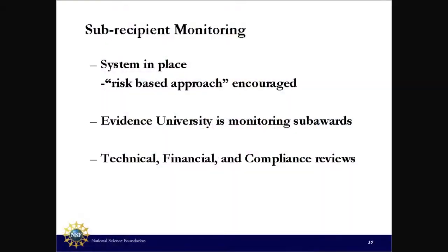Let's say the subawardee doesn't perform or does something illegal. If NSF comes out to your institution and you're the prime, meaning you're here and the sub is here, and the subawardee did something wrong, we don't go after the subawardee. We go after the prime, meaning you. So it's very, very important that you are aware of what your subawardees are doing. That means make sure that you are doing site visits with them, telephone calls, web conferences, emails. Make sure you are on top, because that is your responsibility, because you set that agreement up.